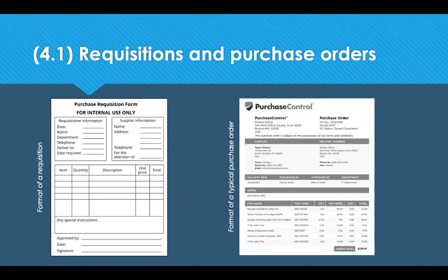So a purchase requisition is used to inform procurement when an item is needed. It has to be authorised by someone who is accountable for the budget. A purchase order is sent to a supplier so that the items can be produced and the need is satisfied. Items are paid for once received, not at the point of ordering, unless of course you're doing an Amazon type immediate payment. But it creates a legally binding contract once the supplier accepts it, and it tells the warehouse staff what to expect.